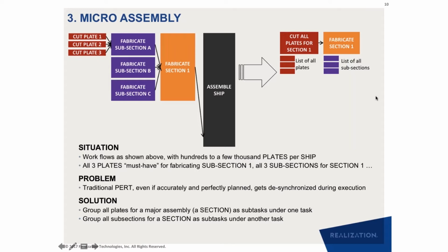That is very good. So in theory, it looks like it will add to time. In reality, it will save you time because you will have all the inputs that you need to start fabricating. Right? The time it takes to fabricate and the time it takes to cut the plate is not a lot. The time really is spent in waiting, and that is what we're trying to minimize here.